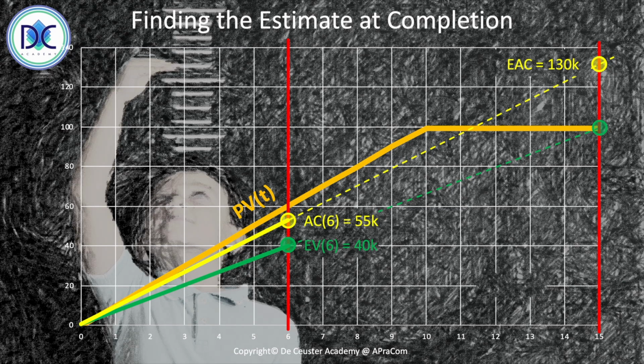So this is the simplified principle of how this works. I use the straight line as an S-curve, so it gives you an easier overview. We normally can do that with an S-curve also, that's not an issue, but it shows you how the formulas work, and we can deduct the formulas very quickly from this. We're not going to do that, but it's a mathematical way how we can also find the estimate at completion for this case with the linear extrapolation using some simple mathematical formulas.